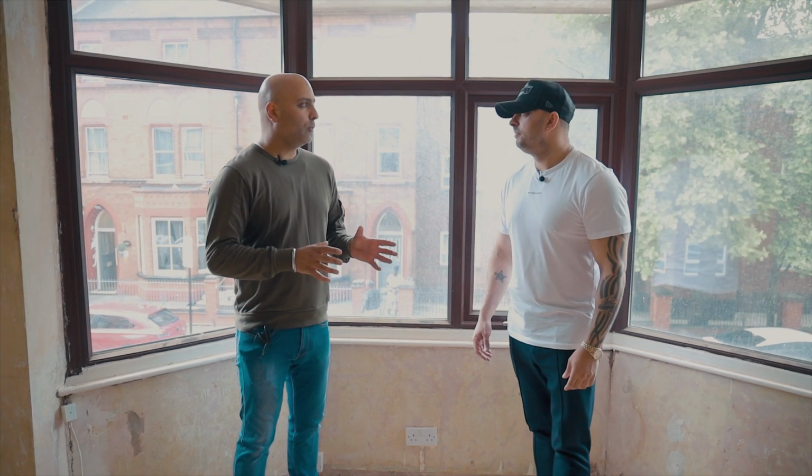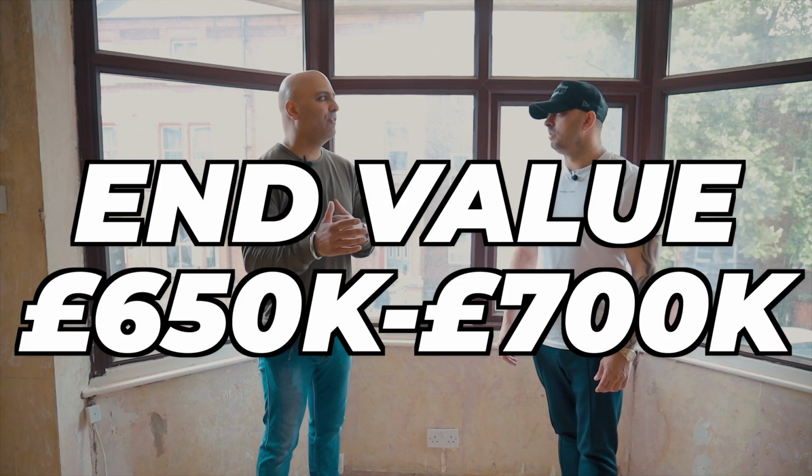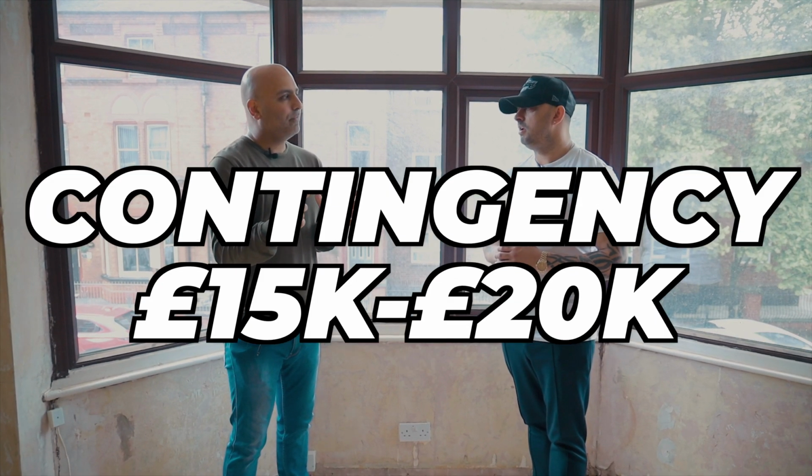What's the end value? So we're hoping, once all the work's done, we'll be close to between, say, 650 to 700,000 once all the work is done. And what's the refurb, renovation, development costs? That was kind of scary. A lot of figures that we were quoted after COVID is quite high because of obviously material prices, but we managed to get a good deal. So the whole thing with the flat included, looking at between sort of 135, and I've left a contingency of 15,000 to 20,000. Okay. So about 130 to 150,000, I would say.